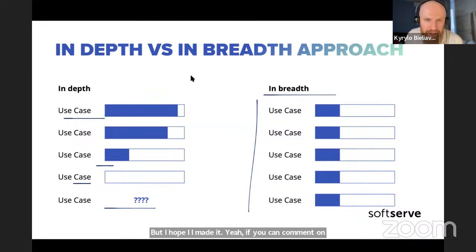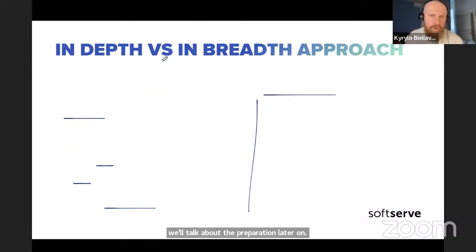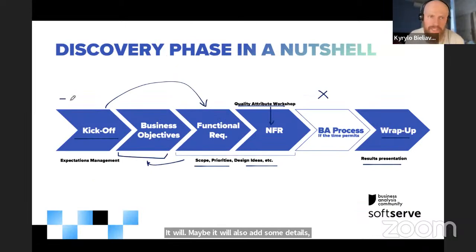Another question: can you please map these 2-3 weeks to these steps? Oh yeah, sure. Why not? Let's go back, and we'll talk about the preparation later on. It will also add some details, but let's go back to that slide. So a kickoff is the first day, so let's say it's day 1. And for the business objectives, I would say you would need 2 days.